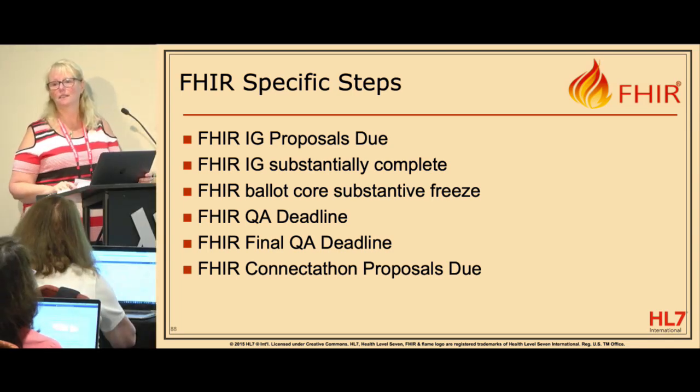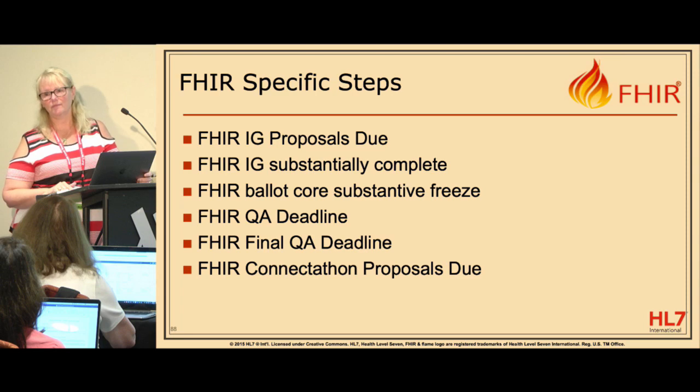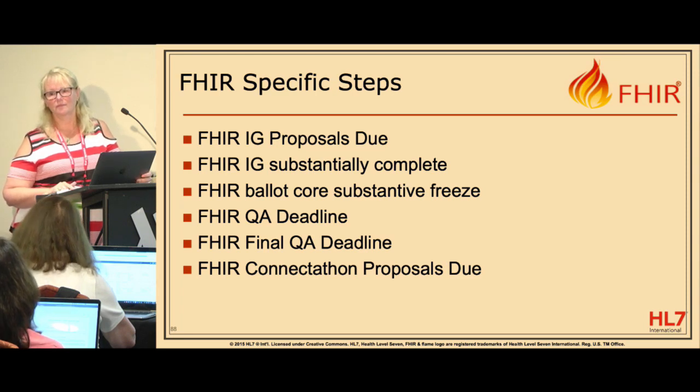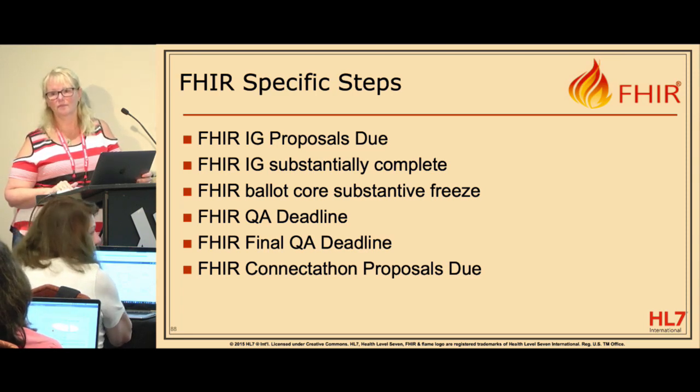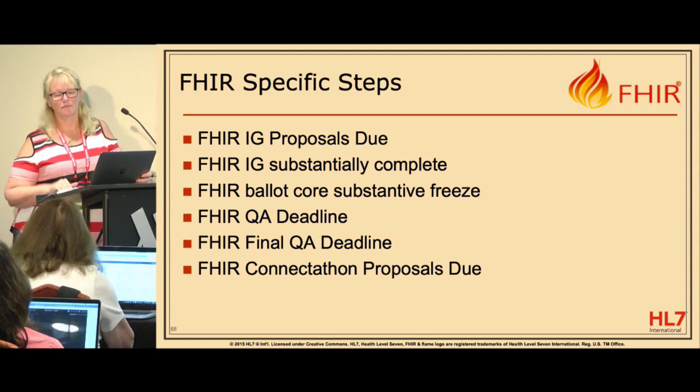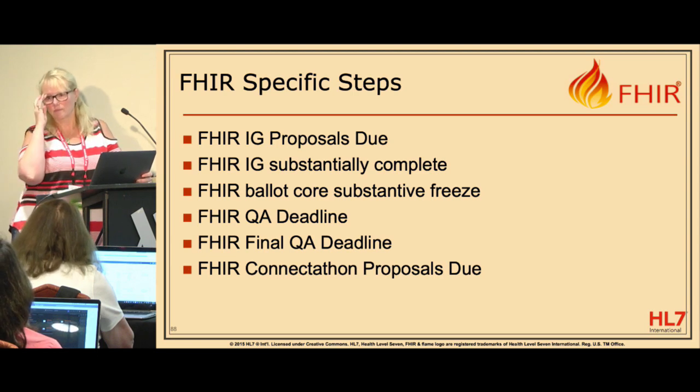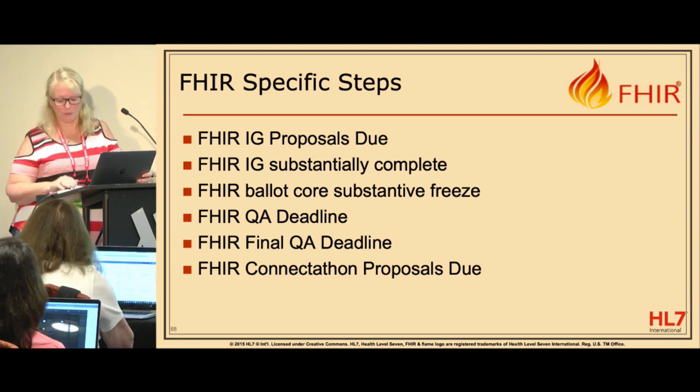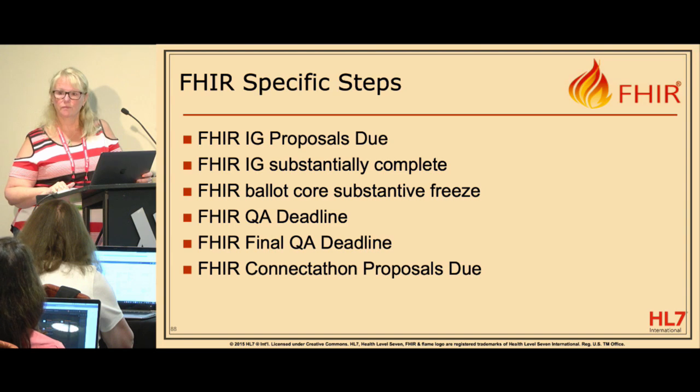Yeah, you can. There's a many-to-many relationship between projects and specifications. So it's possible that there are 3 different work groups who are all doing work on a specification. Each of them will potentially need to have a PSS that covers the work that they're doing. There'll need to be an IG, and it's also possible that one PSS could result in multiple specifications.